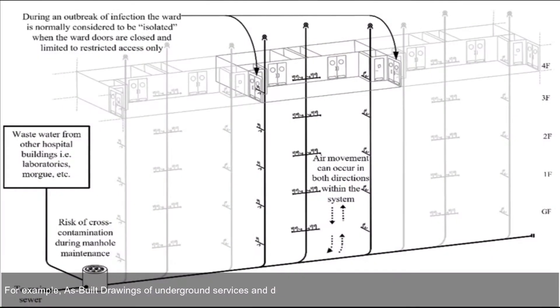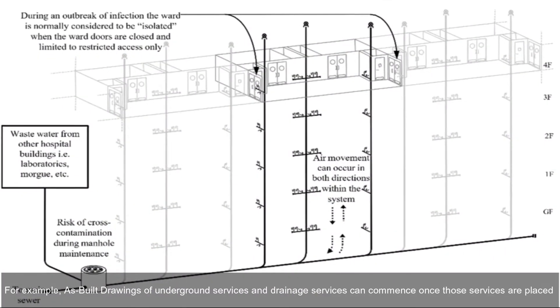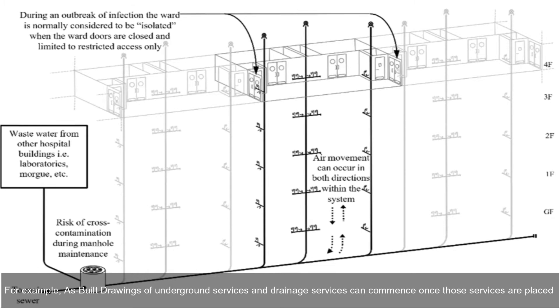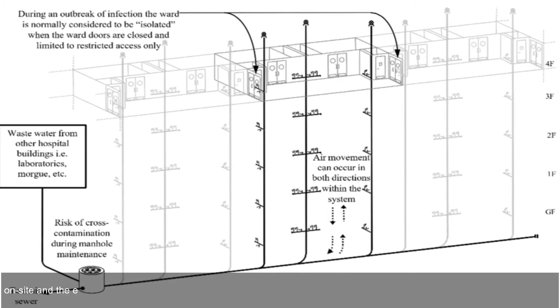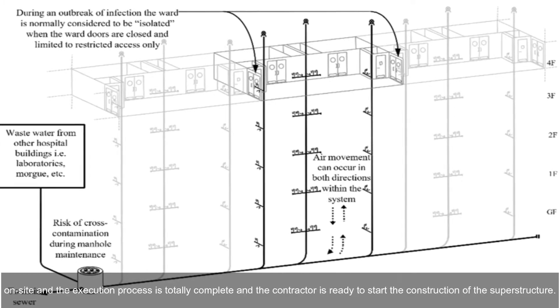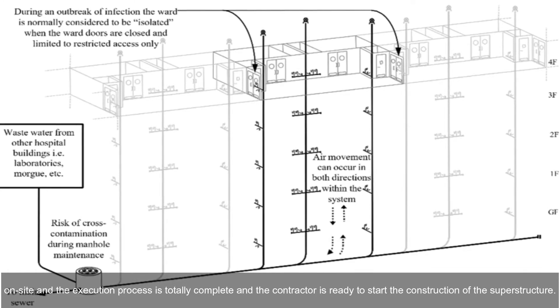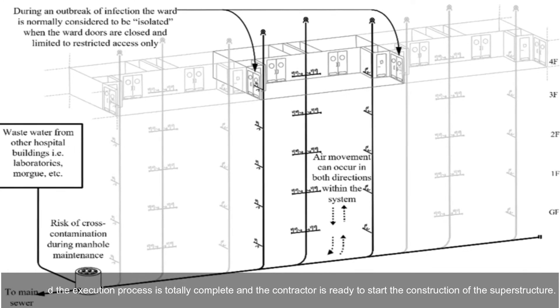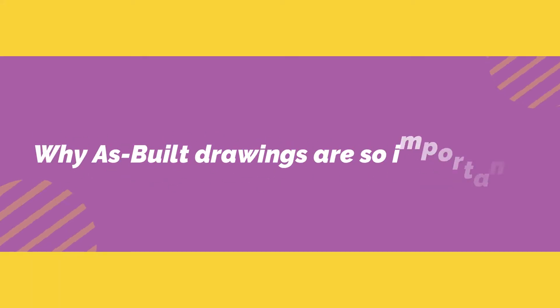For example, as-built drawings of underground services and drainage services can commence once those services are placed on site and the execution process is totally complete, and the contractor is ready to start construction of the superstructure.